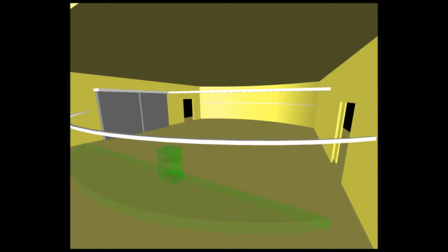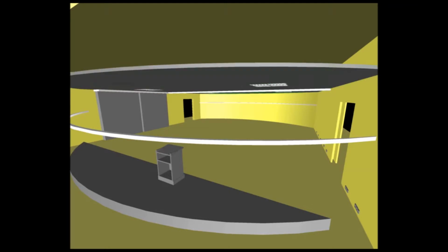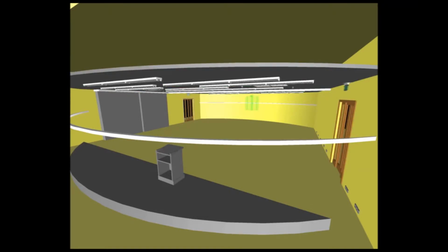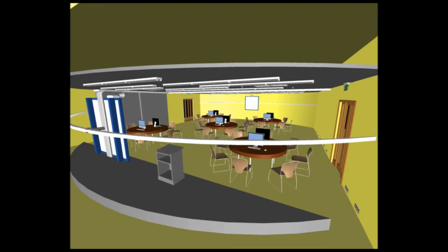Basically, the arrangement is designed based on the degree of easiness to remove or install. All the works could be classified into 3 categories: furniture, building surface and structural elements. In demolition work, furniture will be removed first and then the building surface. And for the construction work, the order of installation will be the opposite. Structural elements like the circular wall will be installed first.